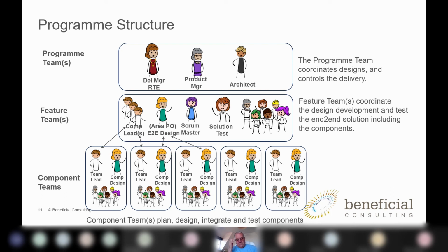So when you're starting to think about your design, you need to think about not just Scrum teams and so on, but also the commercial reality of where you are, and also the geographic reality of where you are. I mean, we're working at the moment with teams based in India, and they're, I think, 5.5 hours ahead of us. So holding meetings at 3 o'clock in the afternoon, or 5 o'clock in the afternoon, most people in India are home and finished work by that time.